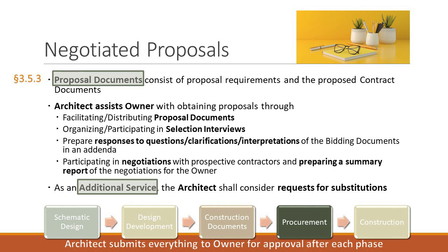The architect shall assist the owner in obtaining proposals by 1. Facilitation and the distribution of proposal documents for distribution to prospective contractors and requesting their return upon completion of the negotiation process. 2. Organizing and participating in selection interviews with prospective contractors.